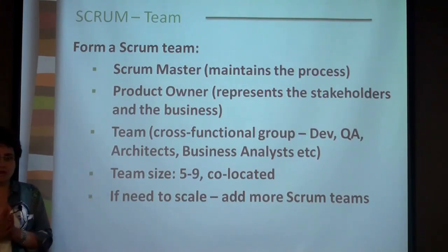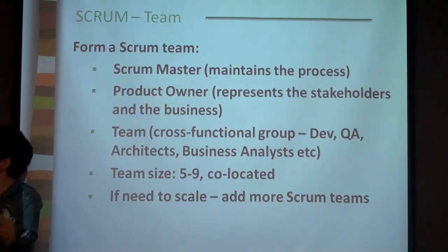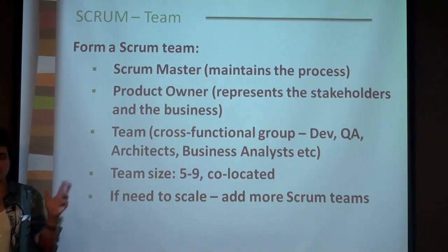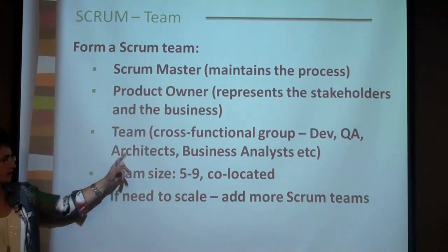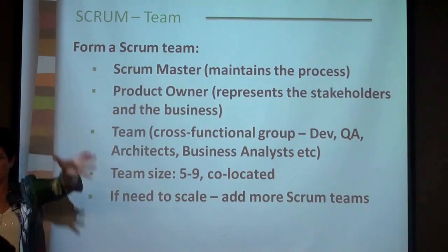Do not increase the size of your team. Instead, make it 2 Scrum teams. If you need more development, do not put everyone in one team. Just have 2 Scrum teams and say, okay, this team is responsible for features A, B, C, and this team is responsible for features X, Y, Z. This way, you can still be efficient in Scrum, and you can still develop the set of features that is needed by just 2 Scrum teams.